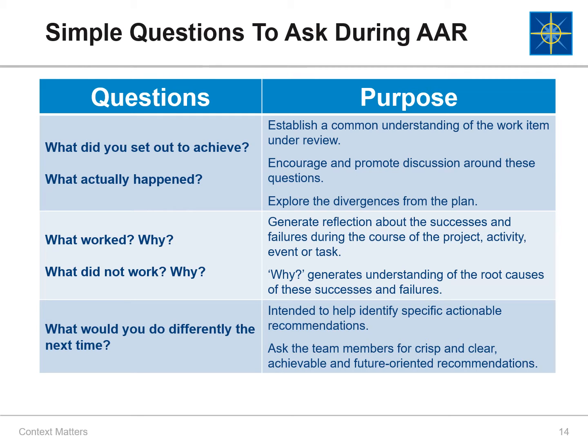Finally, another question is, what would you do differently the next time? This question is intended to help identify specific actionable recommendations, so be sure to ask the team members for crisp and clear, achievable and future-oriented recommendations.